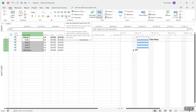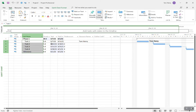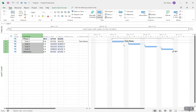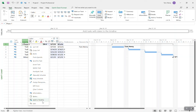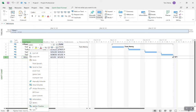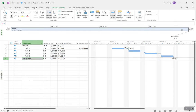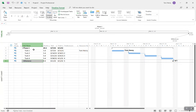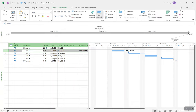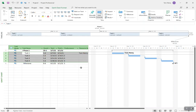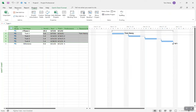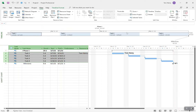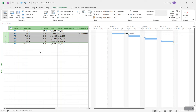Let's link these tasks together using the Link Tasks tool — remember, I'm always in the Task ribbon when manipulating tasks. Now I can see on the right-hand side all my tasks — five-day tasks making a four-week project. You can see up here we have the Timeline, which is a great way to highlight key tasks. You can right-click on any task, milestone, or summary task and click Add to Timeline. You can also pull things around to display differently. Real estate is everything, so I'm going to put it out of the way now.